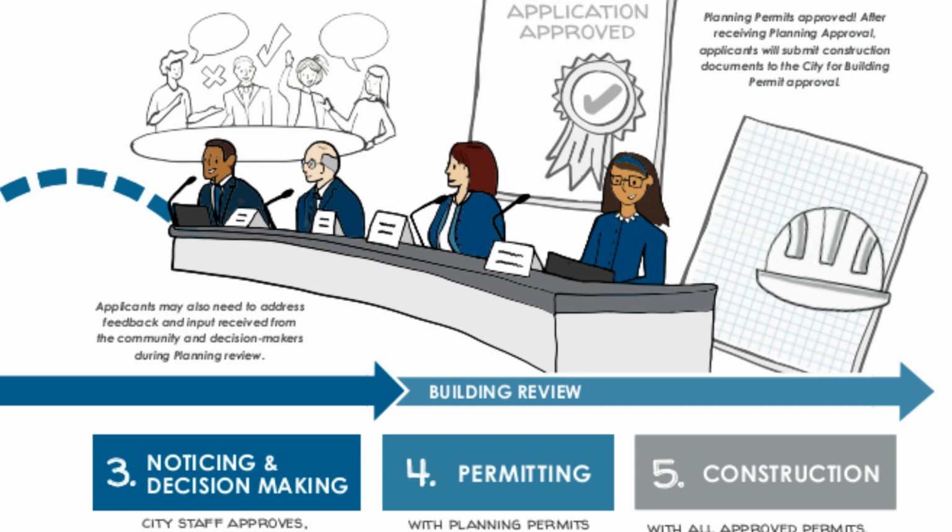Key players in Step 2. Applicant works with planning staff and is responsible for submitting a complete application and associated fees and addressing all city staff comments. Planning staff helps applicants with project completeness for development review and coordinates with other city departments. Some complex projects may require meetings with the community, and it is advisable to get community input early to identify potential project delays due to public opposition to the project. City staff technical experts from engineering, building safety and housing, and fire and police assist planning staff in reviewing submitted application materials. This is the longest step of the process.